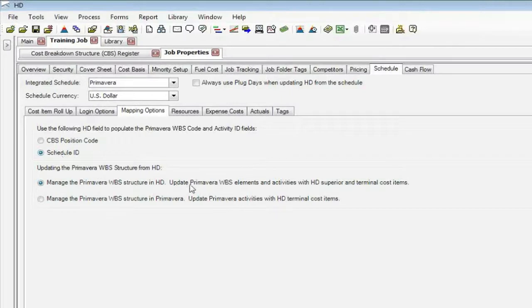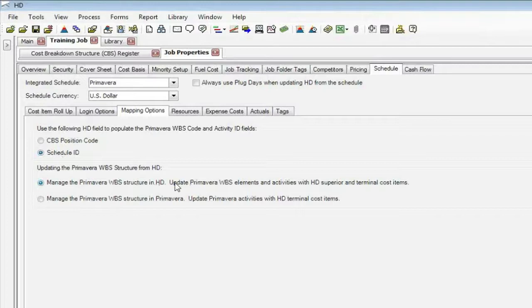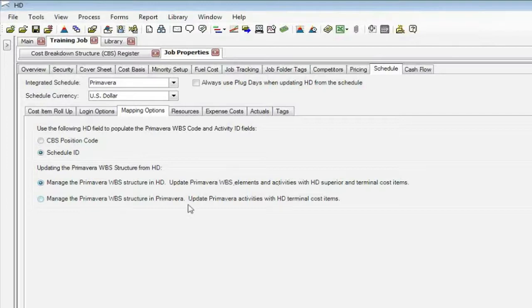We can send the whole structure out to Primavera, meaning what they call their WBS activities, or the WBS elements, I should say, which is our superiors. What they call activities is what we would call our terminals. So this option says I just want to send the terminals, or what they would call their activities.